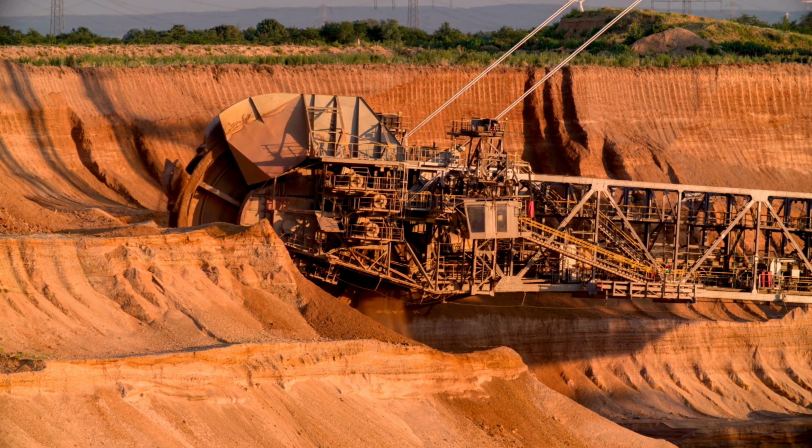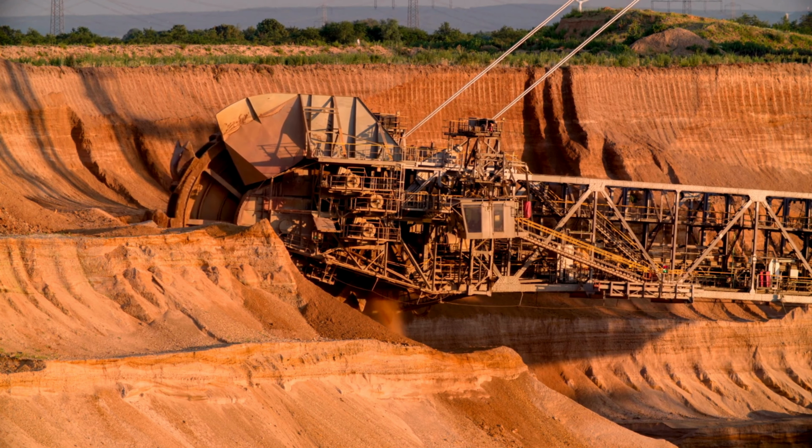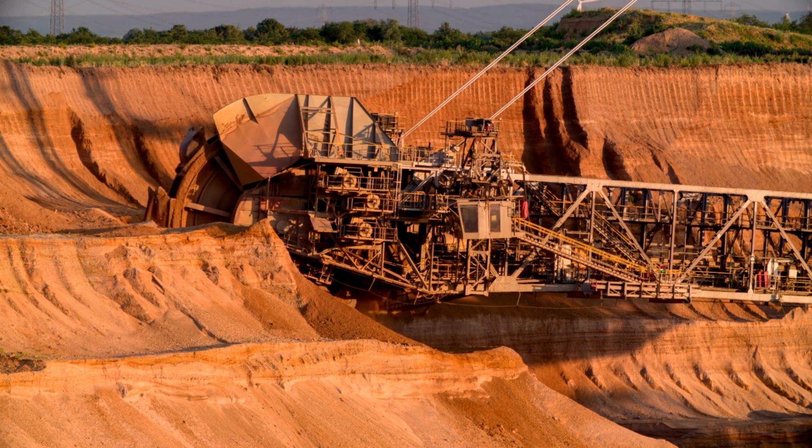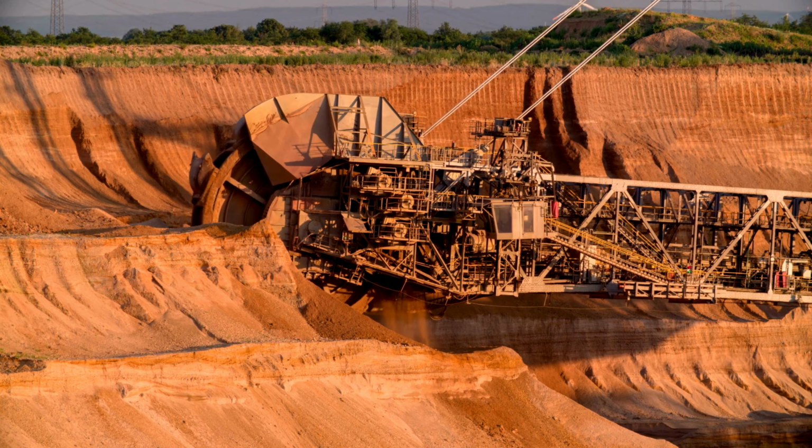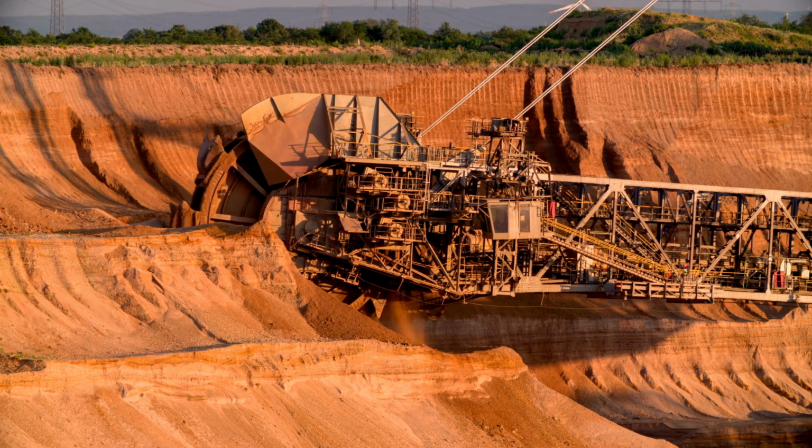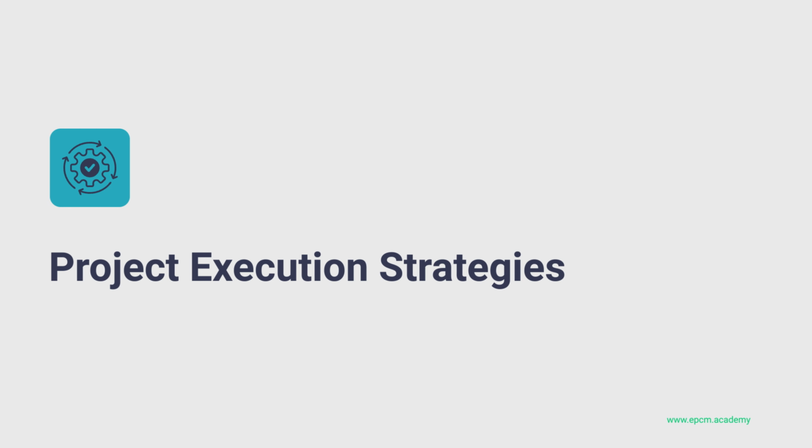And what about procuring all the materials and equipment they'll need, especially in a remote location? Procurement planning is another big one. They need to consider lead times for ordering major equipment, the complexities of transporting materials to the site, and even the process for selecting qualified vendors and subcontractors. It sounds like they're orchestrating a very complex symphony of activities here.